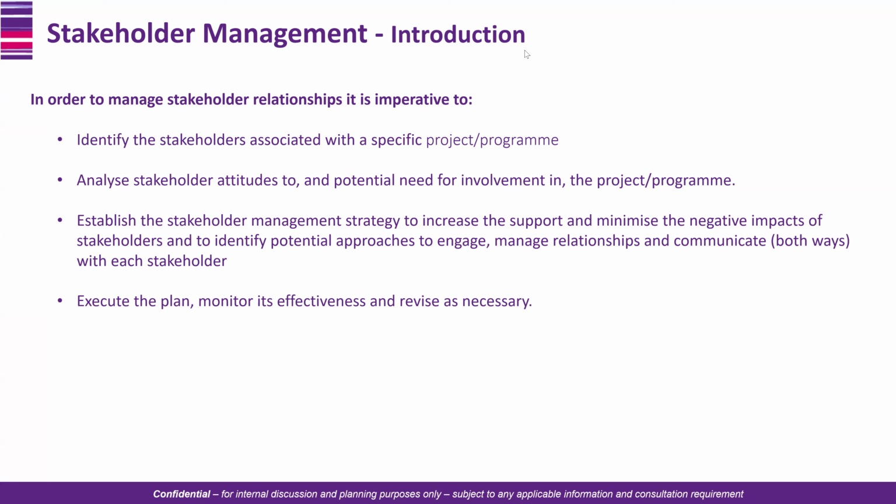For Todimu, very true. I love your analysis about Todimu being 1 and 5. For Deji, 5/5. Yes, Deji can say today, we're shutting down the whole Blue Sky Citadel, we're not doing it anymore. So his power and his interest is high as well, because he wants to see everybody succeed. Can you see how we're doing the analysis now? So when you get on your project, these are the kind of analysis you want to do for your stakeholders within your project. And I always put this caveat when I speak about the stakeholders register: please, the stakeholders register is not meant for everybody to see.